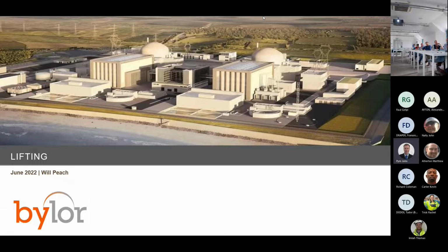So the project controls have in a P6 program all of the pour IDs included. So we can just take that data as a source of truth and map it against this to show the progress.